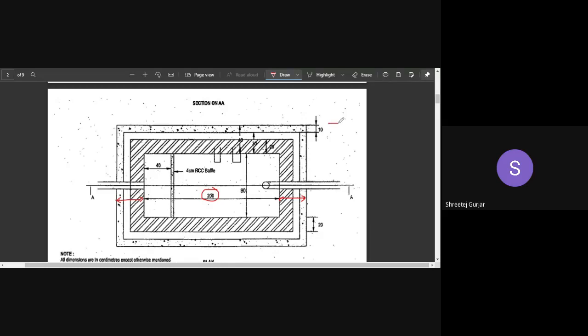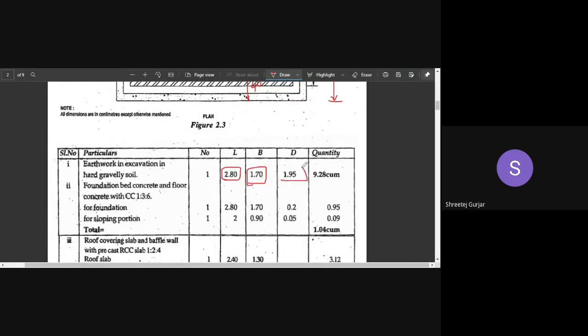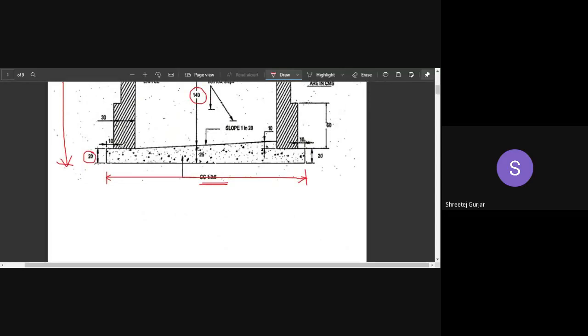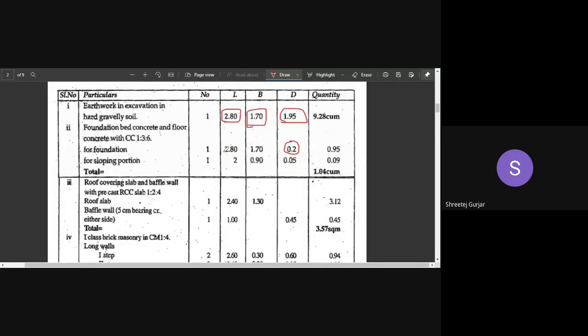So the excavation dimensions are 2.8 m (length) × 1.7 m (width) × depth. For the foundation bed, we consider only the rectangular part — same length and breadth, but the depth (thickness) is 20 cm.